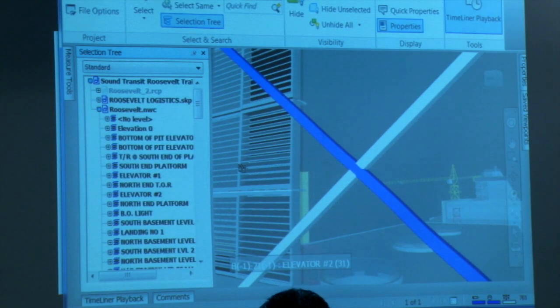Revit architecture? Mm-hmm. We use it a lot because there's a lot of things that aren't modeled, like ceiling grid. Architects don't usually model ceiling grid. They just draw little lines, and a lot of times they don't get it just right. And we need the grid in just the right spot so that all the sprinkler heads, like maybe it's one of those jobs where the sprinkler heads need to be perfectly centered on the tile. So we need to know where the ceiling grid is, but we have to put the sprinkler head in before the ceiling grid shows up sometimes. So we need to know exactly where that grid's going to go, and then the center line between grids is the center line of tile. We need to be able to lay all that out.